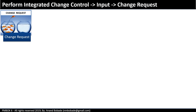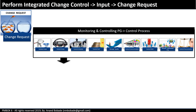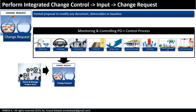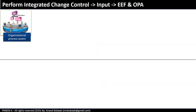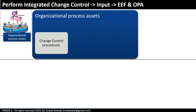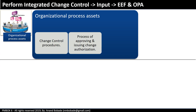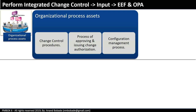Change request: as shown in the diagram, most of the controlling processes produce change requests as output. A change request is also an output of Direct and Manage Project Work, which is the process where you create the deliverables. A change request is a formal proposal to modify any document, deliverable, or baseline. It may also include corrective actions, preventive actions, defect repair, and updates to project documents. Change request is input to Perform Integrated Change Control where it will go through a proper approval cycle. Organizational process assets may include change control procedures, processes for approving and issuing change authorization, and configuration management processes.